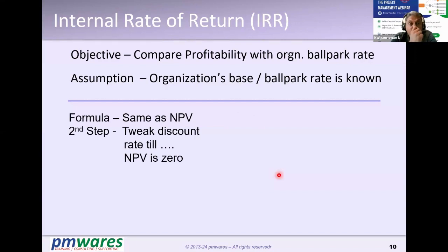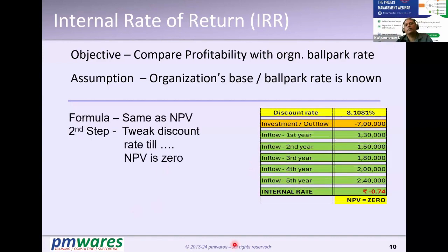So how does this model work? The principle is the same as NPV. The only difference here is that they have combined the feature of payback period within NPV. So what is the feature in payback period? You recover your investment at the earliest. So determine the time element, how soon you achieve that value of 0. That is how this is built into your project. So we will show you an example.